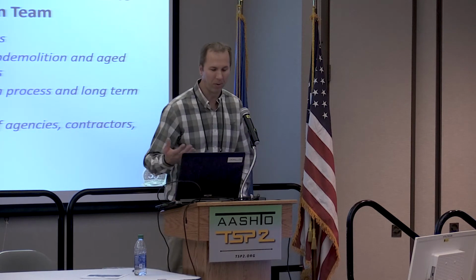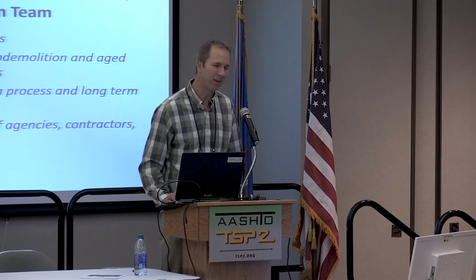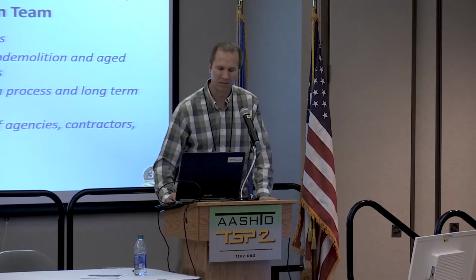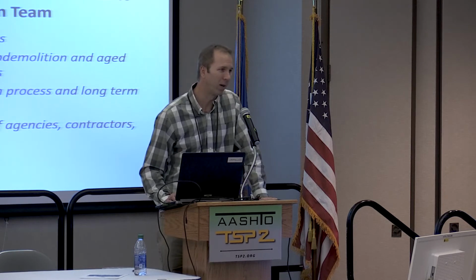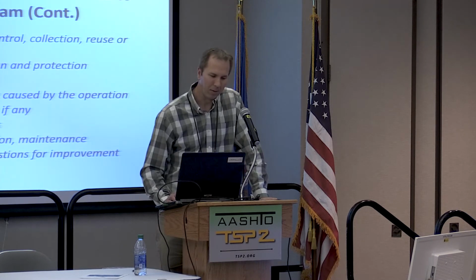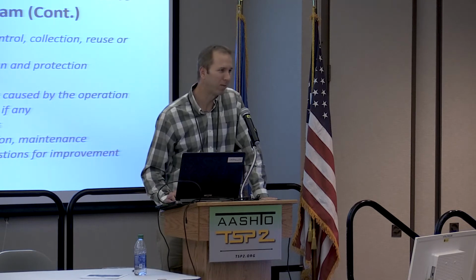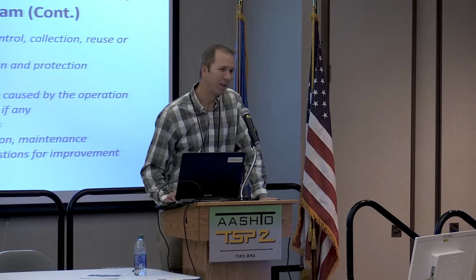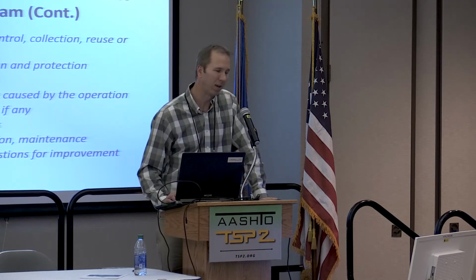We're also going to study the hydrodemolition process and the long-term performance, from a qualitative and inspection report perspective, and then get perspectives from agencies, contractors, and consultants on where the benefits are and the costs and all that good stuff. So there are a lot of areas here that I won't go into in detail, but there are a lot of kinks to work out when you say, I'm going to do hydro. You've got patch removal, you've got water permitting, the wastewater, how you deal with that. If you've got section loss in your reinforcement, how do you chase that out?